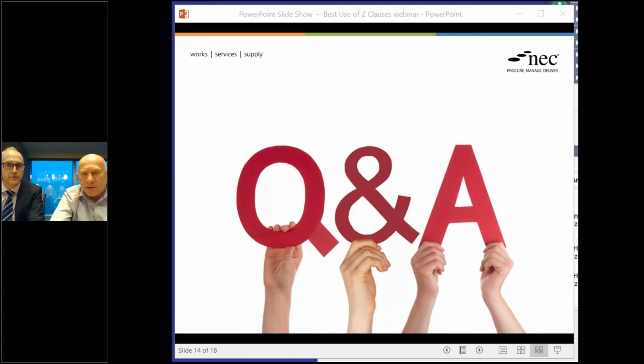Poor connection. Right. So earlier on in the slides, it states that the clause is usually prepared by the employer or the client, but can it be issued or amended by other parties? Oh, that's a very good point, and I meant to say something about that and didn't, which is simply that it's complete freedom of contract in a sense. So if parties want to agree a particular Z clause, they can put it in their contract. But of course, in the real world, and certainly in Hong Kong, it tends to be the employers that come up with the proposed additional conditions, and they go out to tender on those.